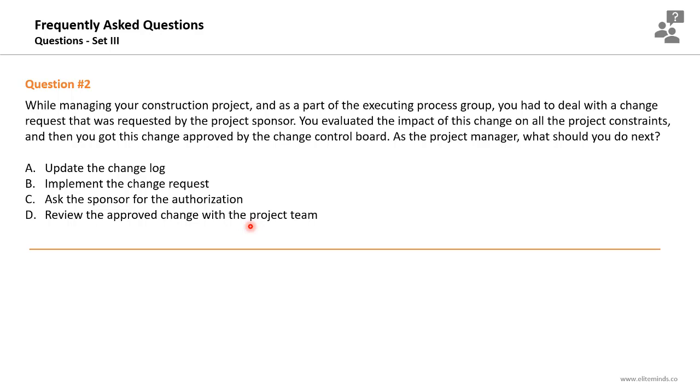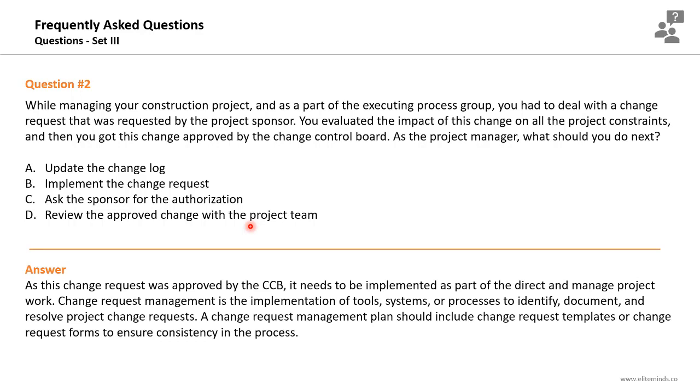After getting the change request approved, you cannot ask the sponsor for authorization. There is no need to review an approved change with the project team. So the first step is implementing the change requests. As this change request was approved by the change control board, it needs to be implemented as part of the direct and managed project work, as approved change requests are inputs to the direct and managed project work.